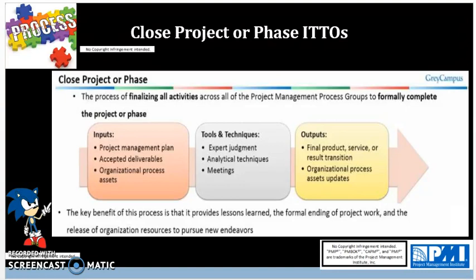Next, we have product handoff, which is getting the customer sign off and also handing off all of the documentation and making sure that the new product owner is aware of what is going to be done once they take over the project and what needs to be done to maintain it and not lose any value. The worst thing that can happen here is that the new project owner or project manager does not know what to do with the deliverable and starts from scratch again, which is basically a sunk cost. So we don't want that to happen. Next is going to be procurement or contractual closure. Keep in mind that there could be multiple contract closures that can happen in a phase or project.